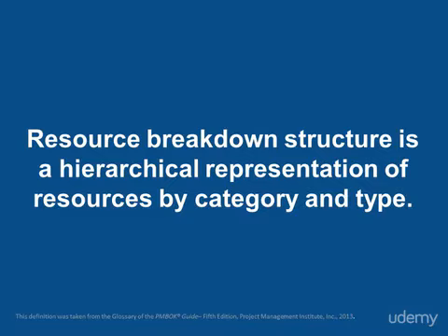And finally, we have the RBS, the Resource Breakdown Structure, which, according to the PMBOK guide, is a hierarchical representation of resources by category and type. But before we move on, RBS, by the way, is a shared abbreviation for both the Resource Breakdown Structure and the Risk Breakdown Structure.